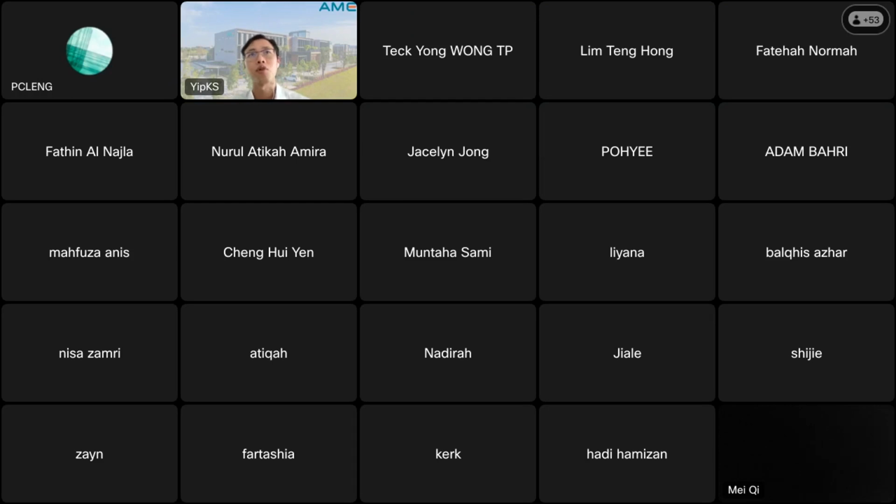One of the tips for clash detection, and I fully agree with Architect Wong: whenever you run the clash detection, you will come up with 1,000, even 10,000, 20,000 clashes. It's a long list, and the tip is you need to know how to filter out those not significant clashes. For example, if your pipe clashes with the plastering, it is not a real clash.